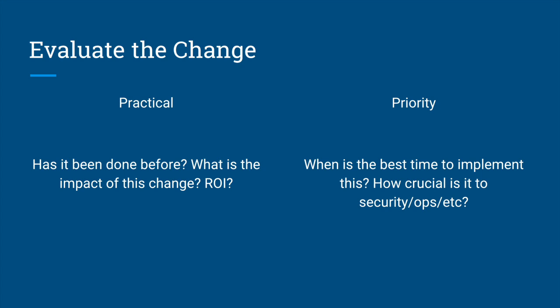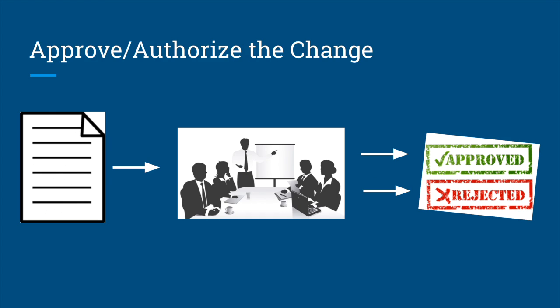After reviewing the request, an owner is assigned to the change. They will be in charge of implementing that. The next step in the process is to approve the change. Change requests require approval and authorization from different departments within the company. Going through an approval process facilitates the sharing of information between the interacting individuals. This leads to addressing topics that might have been overlooked.